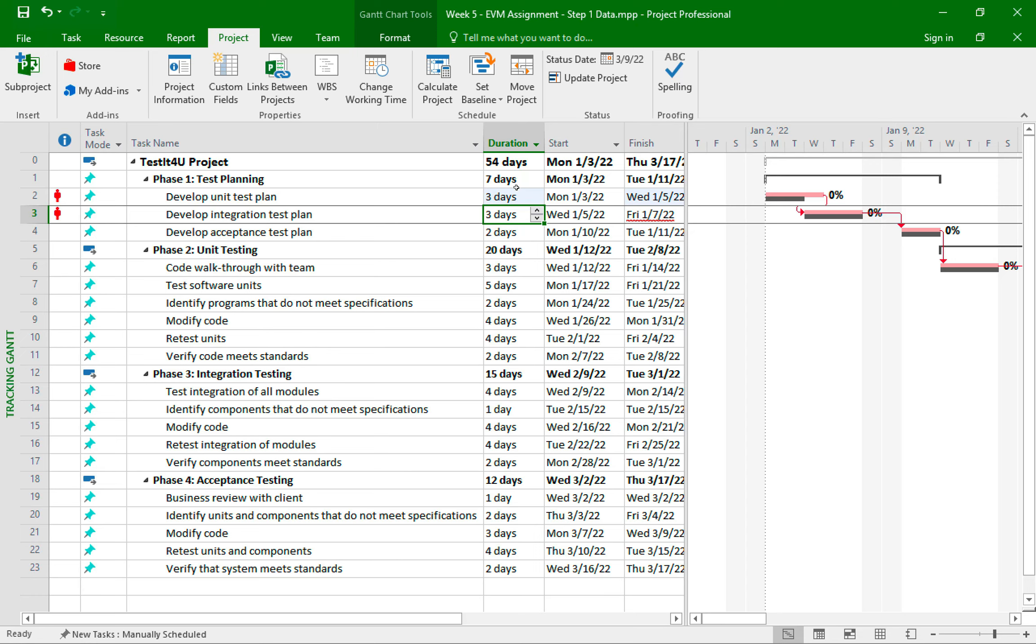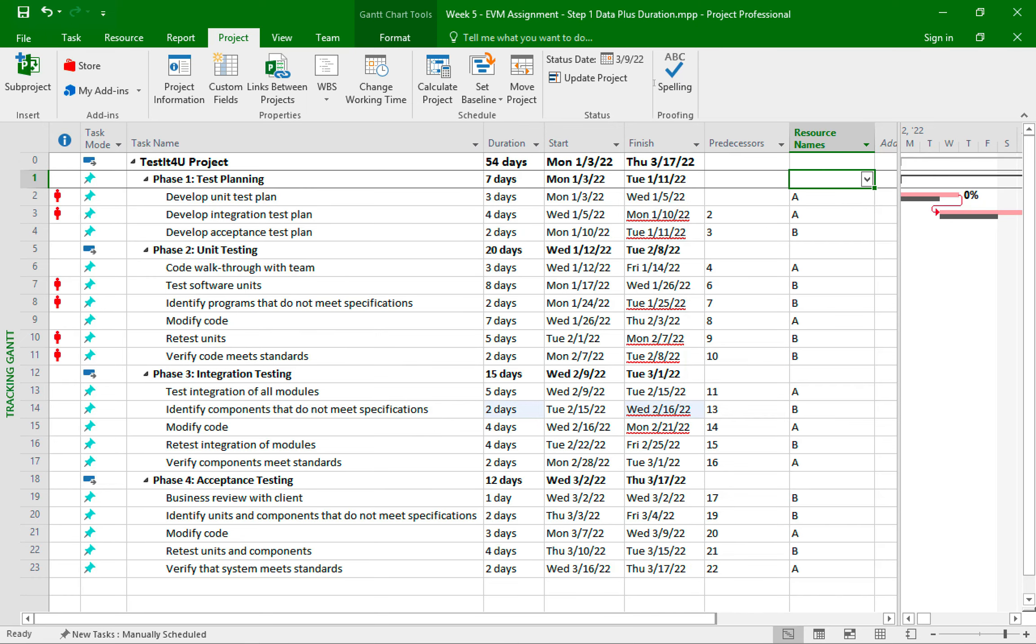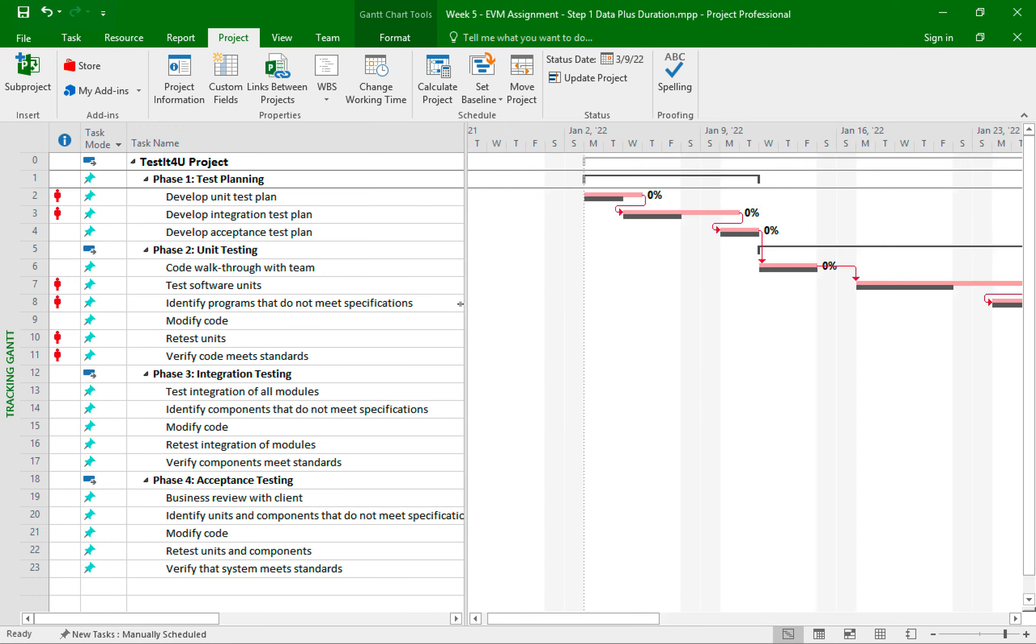Okay, so now that I showed you the first task update, I'll go ahead and enter all the updated duration per the assignment step two. And here we are with all the updated duration entered, and you can see how the Gantt chart has changed as well.